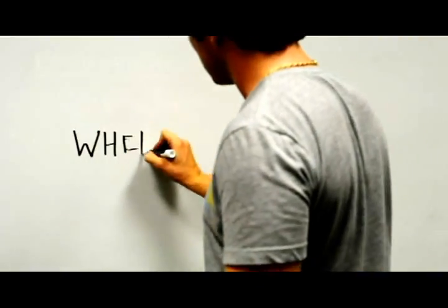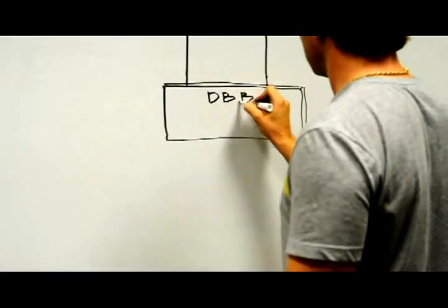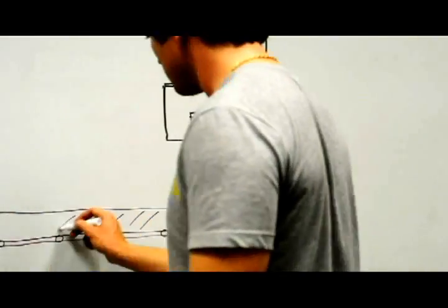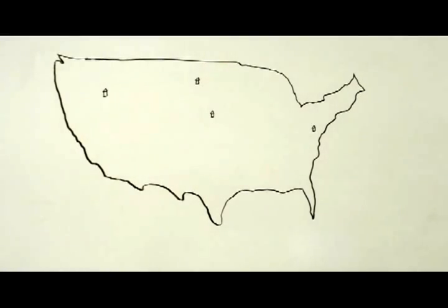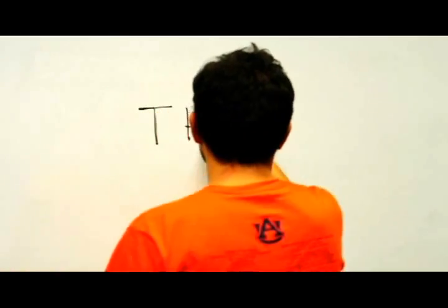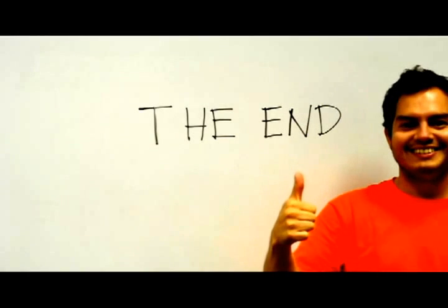So when does design bid build work better and where is it most applicable? As mentioned earlier, the traditional method works best with prototypical designs improved by iterations, such as schools, retail stores, and food chains. In such cases, the design team can fine-tune the contract documents after each project is completed. The design bid build will continue to be used in sectors of the industry where mass production at low cost and high quality is demanded. In small-scale projects, it is still the number one project delivery choice, and for young professionals, it is the first milestone on the path to a successful project delivery career.